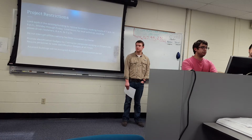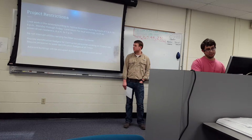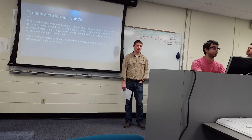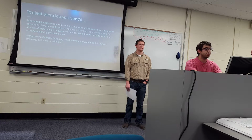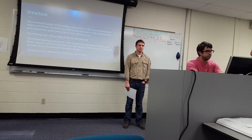And adjacent buildings will be occupied during the entire construction period. So that being said, we need to schedule deliveries to minimize use of driveways and entrances, and we need to schedule them as well to minimize the space used for storing materials. It's a non-smoking campus. No employees will be smoking at all in the parking lot, in cars, or anything.